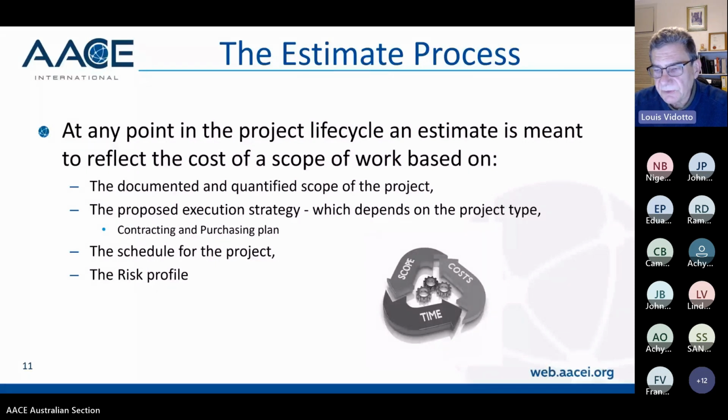When we're building estimates, it's important to know what the risks are. And one of the things that we talk about a lot is what is the risk register. And that really then comes to when you do your contingency analysis, covering for those risks, and the company or the owner will take a view on whether they can afford that risk or they need to put it into the contingency.